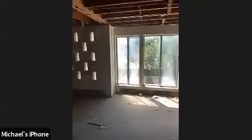So we're just painting up. Are we skinning those block walls and the brick walls, or are we just painting them over? They get furred out an inch and a half for the new electrical plugs and insulation. Okay, good. So we're just burying it all. Anywhere there's any kind of paint at all, it's going to get buried anyway. Well, the windows that he just showed you, that is to stay. Okay.